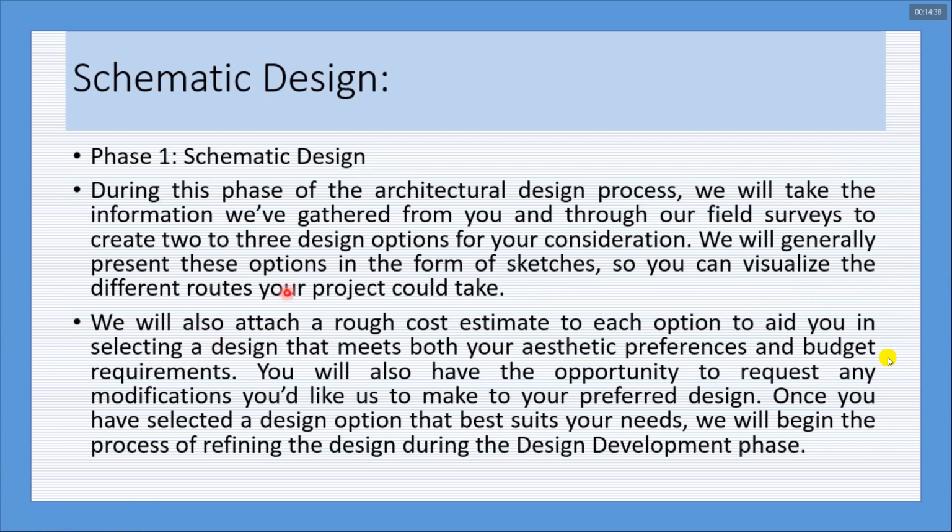What you gathered from this phase regarding field surveys, you make alternative designs. From those alternative designs and sketches, you visualize what the route or pathway will be for your project to take off further. And after that, you discuss the budget constraints and aesthetic preferences of the client, and you almost finalize your design, the selected option, and you refine that selected option in the next phase, which is known as the design development phase.